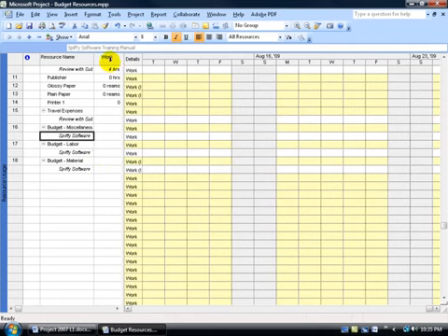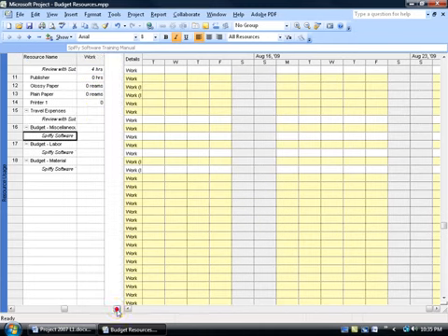Well, you cannot enter it in the work field here because it's not work, it's a budget. So let me scroll over. I've got no additional fields. What we need to do is we need to insert those additional fields. I need to insert my budget cost field, which I can enter in the cost for my budget here. And then for the labor or the work and the materials, I can just insert the budget work field. It'll allow me to enter in the hours for the labor and the units for the materials.